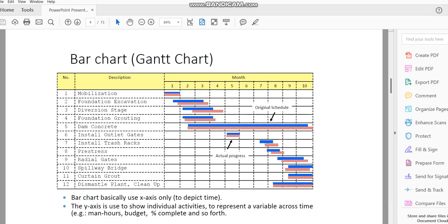So what happened is, you've gone through how to produce a Gantt chart. You've gone through resources, picking your resource numbers, and then doing a production rate. And then after that, you move on and create your project duration. From your project duration, you're able to create your first Gantt chart, and then in between, like I said, you still can do some risk management and all that. Then, or factoring up and factoring down as well for the duration. So once you've got duration done, you've got sequencing.